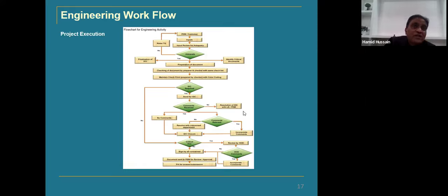For example, if a control room is being made just by a civil engineer, then they have to send it to the instrumentation engineers. Or if a substation is designed by a civil engineer, then it has to be reviewed by an electrical engineer. They have to certify that after the civil construction of the complete substation, it will be feasible to have my cabinets, the layouts and all those things, and whether those rooms are adequate for all their equipment or not. So these are the interdisciplinary checks which are always required.